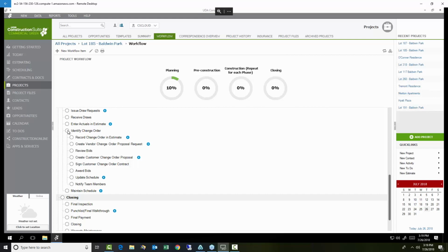And as a reminder that these things need to be done so that we don't end up with a hiccup at the end of the project, where maybe one of the subcontractors forgot to release his lien on the project, and here we are trying to hand it off or sell it, and the whole thing is delayed a couple of weeks. That affects cash flow, something we talked about last week. But in this case, prepping all these steps, making sure that it's well documented, means that those hang-ups never happen anymore. So again, working with these workflows, it's an ideal way to make sure that you guys don't get surprise hang-ups at the end of your job. Document everything, and then you don't have those. You don't have to worry about it.